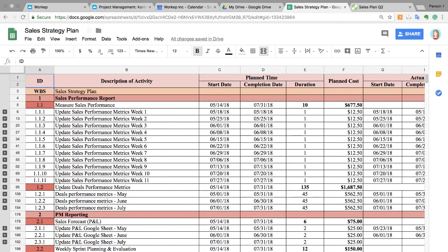Estimates are a huge part of the waterfall method, because within agile methodology, teams manage their time through sprints. So every 15 days, we have a set of activities that we need to make sure we accomplish within those 15 days. And if the activities aren't accomplished within those 15 days, then the activities that were not done would go into a backlog, and they'll be worked on in the next sprint. But as you can see, it's a lot of short-term planning.